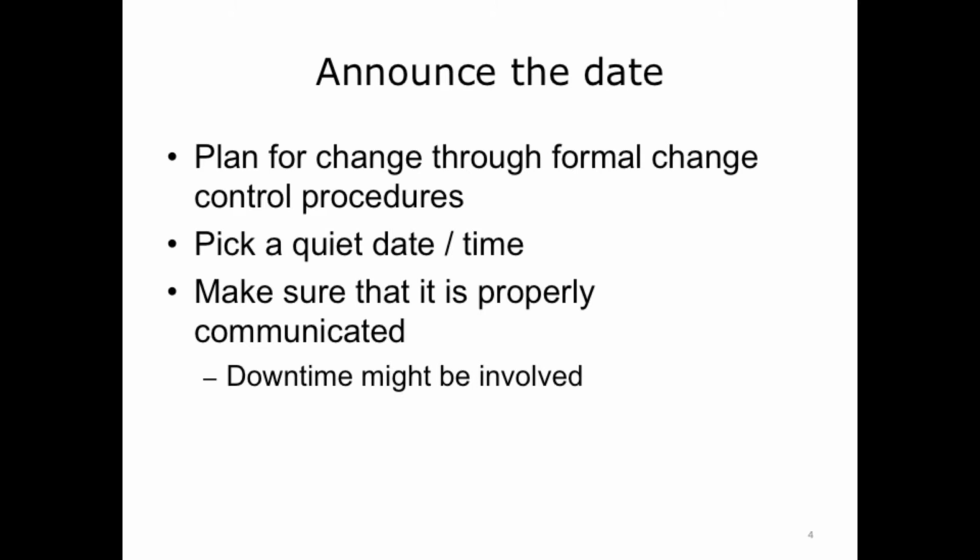Change management is described in detail as part of a set of processes known as Information Technology Services Management, or ITSM. Basically, it is important to pick a time that works with everyone involved, to communicate widely about the change, and to plan for any expected downtime. Interfaces are very important, so downtime of interfaces can be very disruptive to operations.